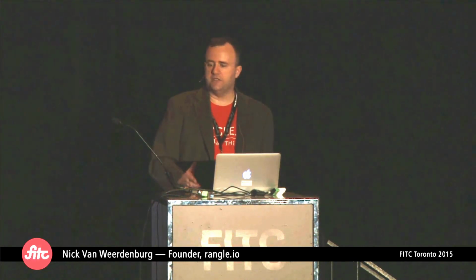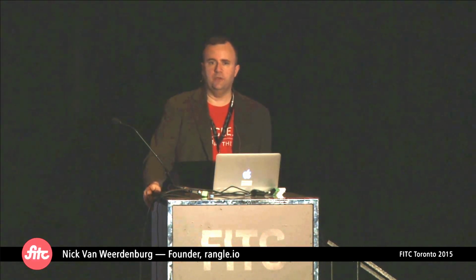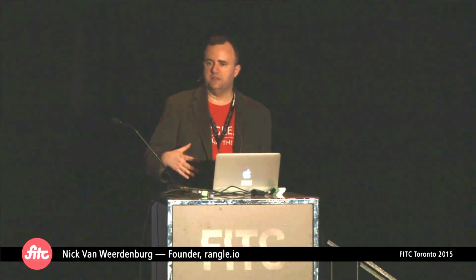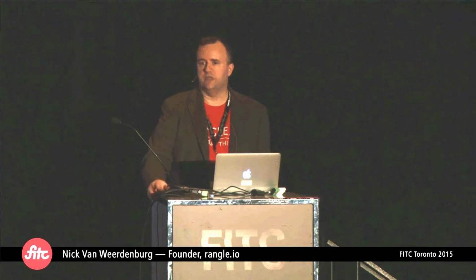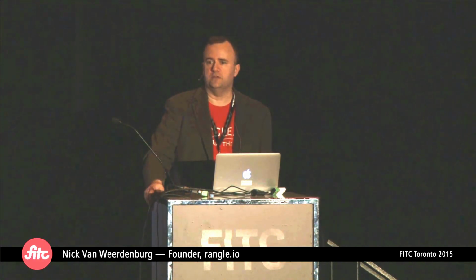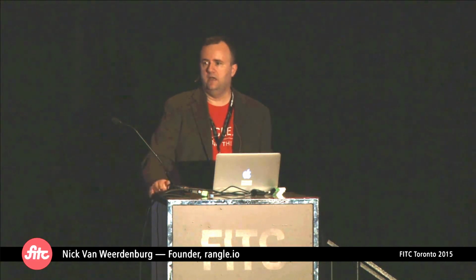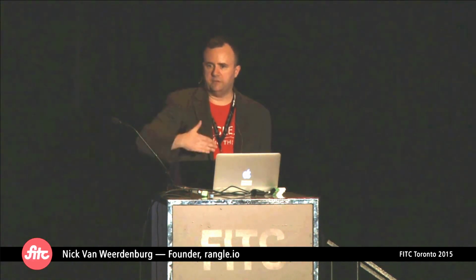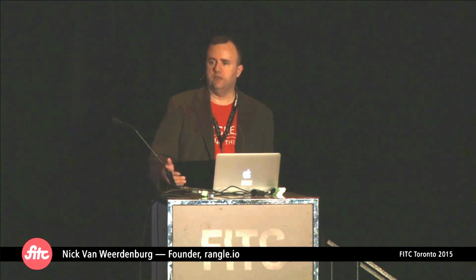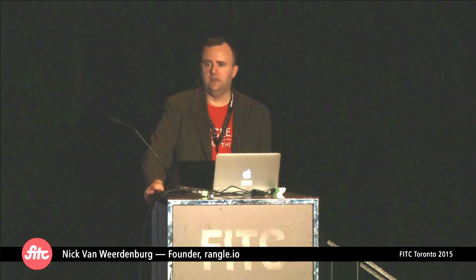If we're having these conversations and we won't be building it for, say, 3 or 4 weeks, maybe because of the schedule of the client, or we're bringing in some business domain experts, then we actually have to write specs because there's just no way we're not losing too much information. So we sort of measure it from that. Then we'll use Google Docs and write a spec for that particular feature and link it into the user story. It's really just a question of, is everyone feeling comfortable they can build it? And not just now, but say, 6 weeks from now.